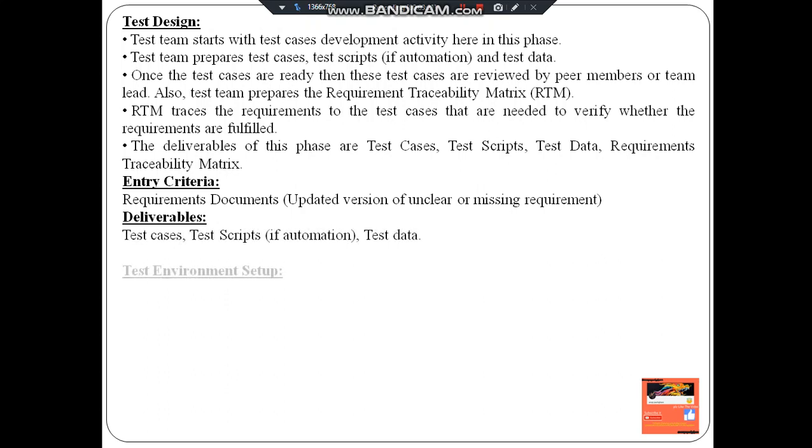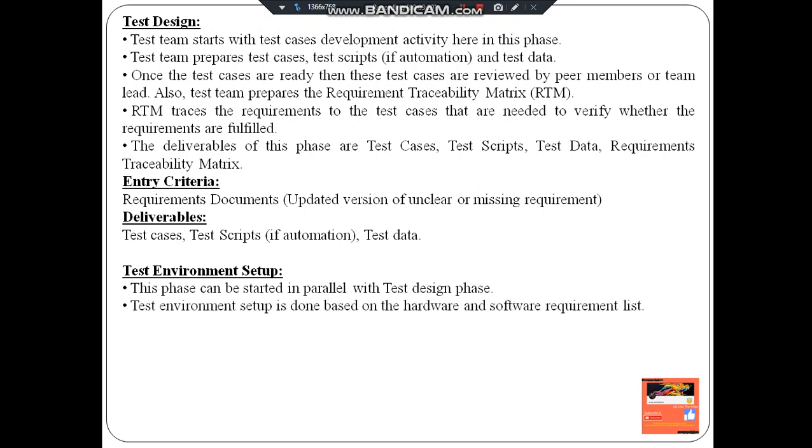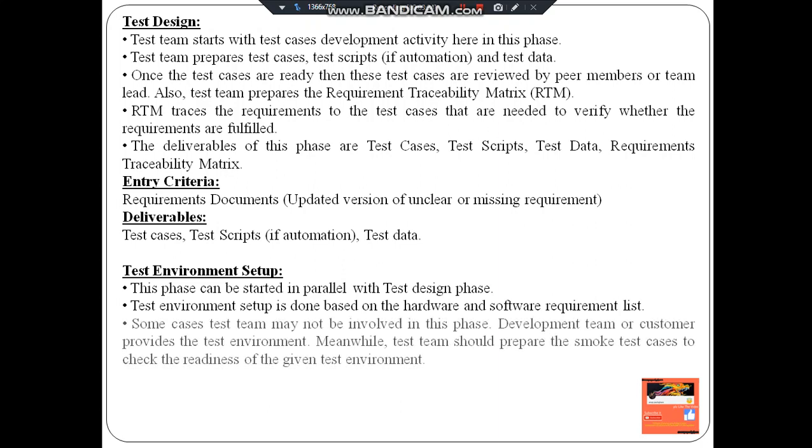Fourth, test environment setup. This phase can be started in parallel with the test design phase. Test environment setup is done based on the hardware and software requirement list. In some cases, the test team may not be involved in this phase. The development team or customer provides the test environment. Meanwhile, the test team should prepare the smoke test cases to check the readiness of the given test environment.